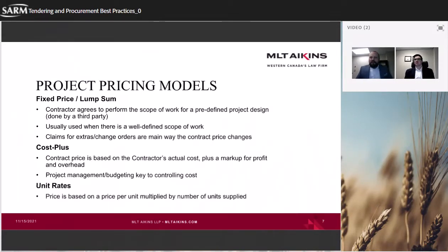The next thing that we see is cost plus, which is exactly what it sounds like, where our contractor is going to be charging us all the direct costs which they have incurred, plus some percent markup, typically cost plus 5% or 10% or 20%, whatever the prevailing market allows, especially within that competitive tendering tension that we attempt to create with our procurement strategy.